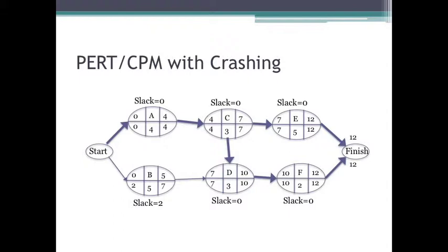In the same way, if we crash E, and only E, for critical path ACE without doing anything for critical path ACDF, then that other critical path will take 12 weeks. We have to crash all the critical paths if we want to reduce the completion time for the project. So, which task or set of tasks gives us the smallest price for doing that?